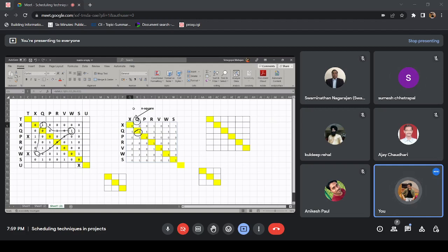So it might happen that if you square the matrix, all the diagonal elements are still zero. So you don't know where to start, but you know that there are loops because you couldn't partition it fully. Having a zero diagonal value in n square doesn't mean that it cannot be in a loop, right?